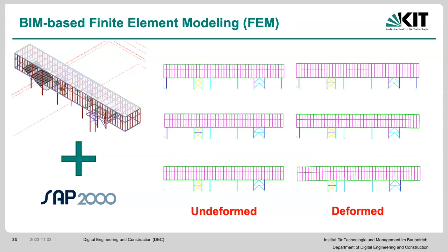They needed to know what this displacement is, and with that displacement, they needed to know whether that is within the tolerances that they could expect, because afterwards, once this particular skeleton was built, which most of it was prefabricated, then prefabricated windows came around it. And those windows had what we call a very long lead time. That means that it needed to be ordered and then assembled to custom, and that customization took like a year for them to be able to do that.